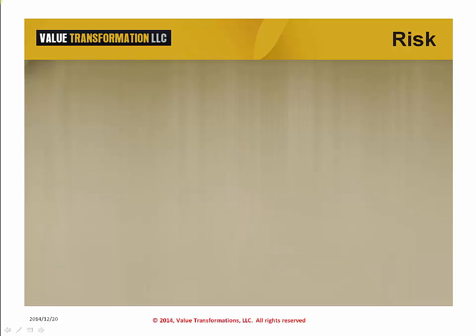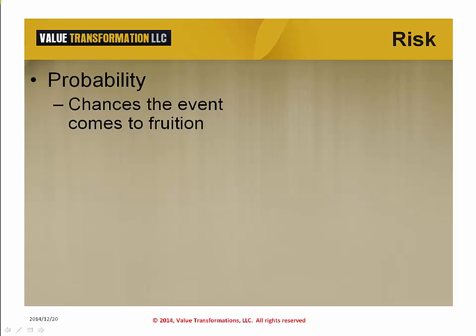There are two dimensions to risk. Those are probability and severity. Probability, or chance, is the mathematical or statistical portion of the situation. If we are drawing the shortest straw and there are 4 other straws, we have a 1 chance in 5 of picking the shortest straw. That is the same as 20% probability of picking that straw.